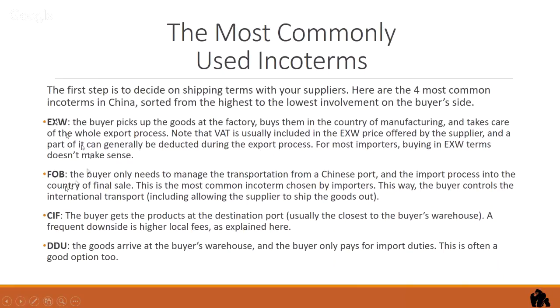So FOB, I'm just going to go through the most popular. Ex Works, the buyer picks up the goods at the factory, like I said. The factory is responsible for the gate only. You have to pay all the import-export duties in China.